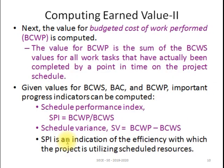Next, we calculate the Budgeted Cost of Work Performed (BCWP). The value of BCWP is the sum of BCWS values for all work tasks that have actually been completed by a given point in time on the project schedule. At any given point, whatever tasks have been completed — their BCWS values are taken and summed to give BCWP, the Budgeted Cost of Work Performed.